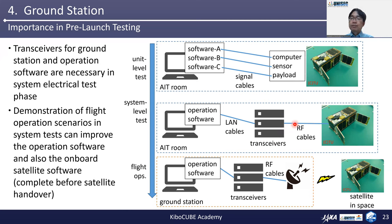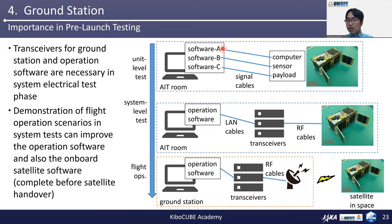We will have several months or half a year at most after the handover of the satellite before the start of operation. In lots of cases, we need to concentrate on satellite development itself before the handover, and we cannot use our time for preparation of ground station and operation software. When forced, we continue to use very simple debugging software for the system-level electrical test. After the handover of the satellite, the flight model is not in our possession, and we cannot improve the onboard software to enable very effective operation methods, even if we come up with new ideas.